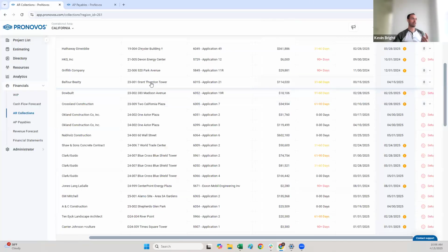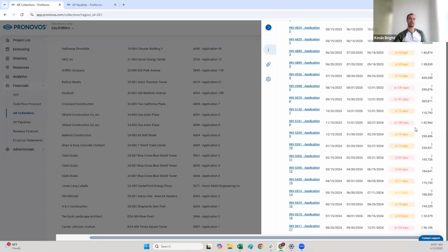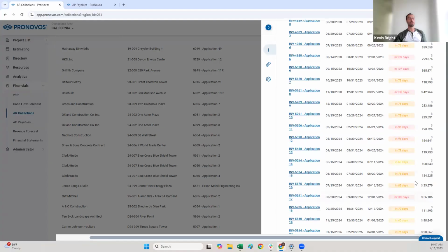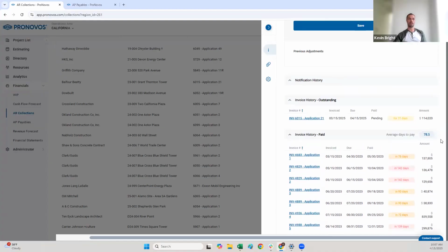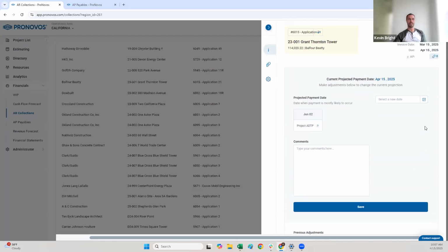So let's see if we can find one here. Yeah, here's a good one. On here, I can see, okay, it's historically taken 78.5 days for my client to pay me on this project. And that's across, looks like, over a dozen invoices. So that's a pretty good track record there. So I can see this has been pending for 31 days. Well, based on their history, I realistically am not going to expect to get paid for another 78 days.